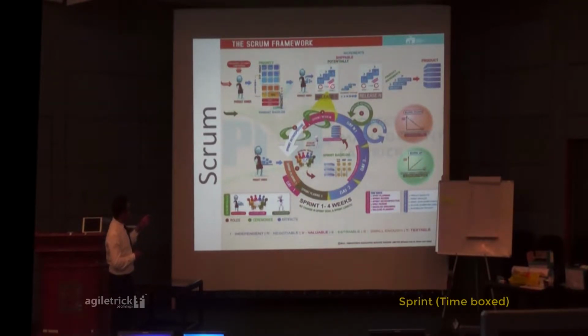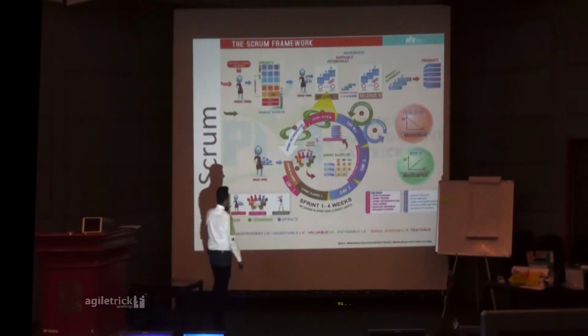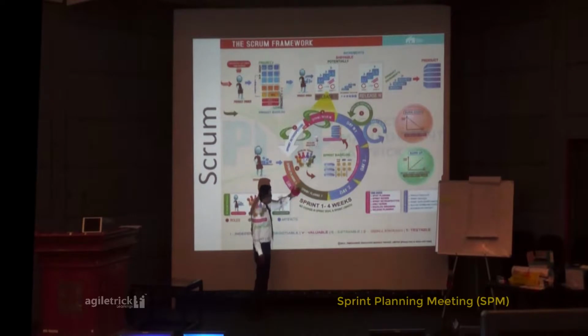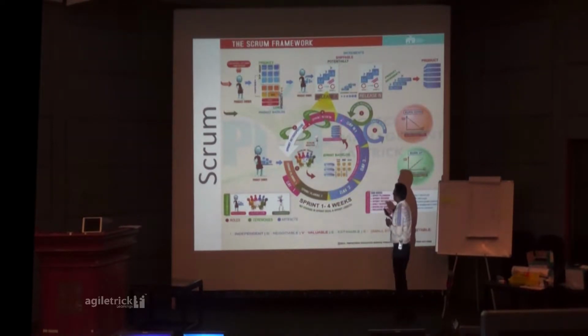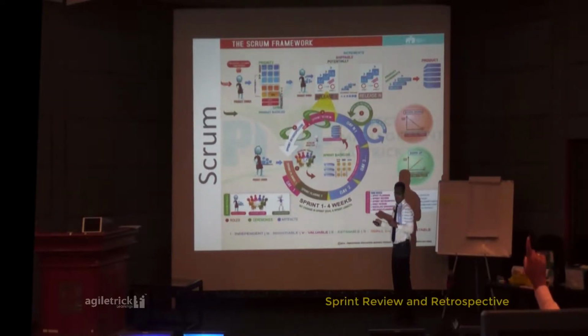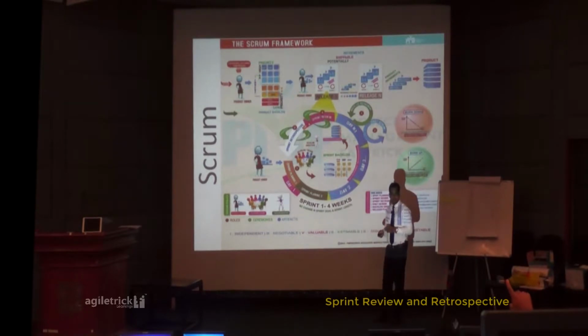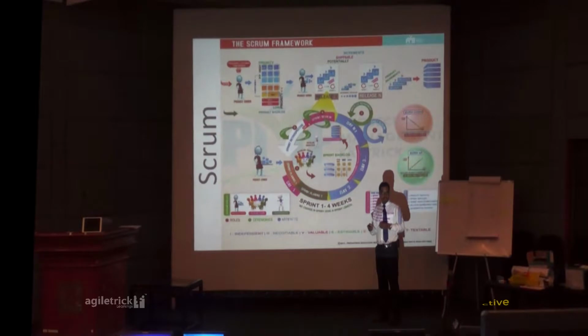If we zoom in on that sprint, you find this is the sprint cycle. Here, what's happening is sprint planning meeting 1 and sprint planning meeting 2 on day 1, then day 2 through day n-1, and then day n, which is the last day, called sprint review and retrospective. Release one contains n number of sprints, right? Yes, it may contain one or n number.